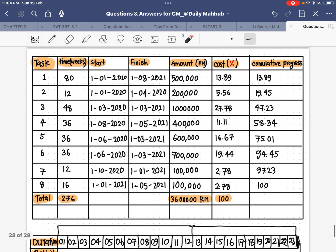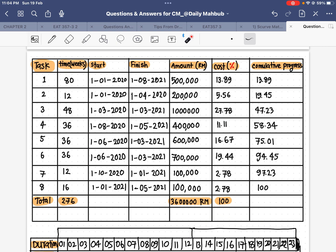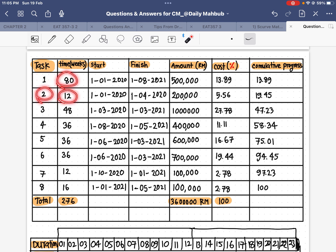From our table we can see we have eight tasks. For each task there is a duration — for the first task 80 weeks, for the second task 12 weeks, for the third task 48 weeks, and so on. All this information is taken from the table. The starting dates are also given, but the finishing dates are not given and must be calculated.